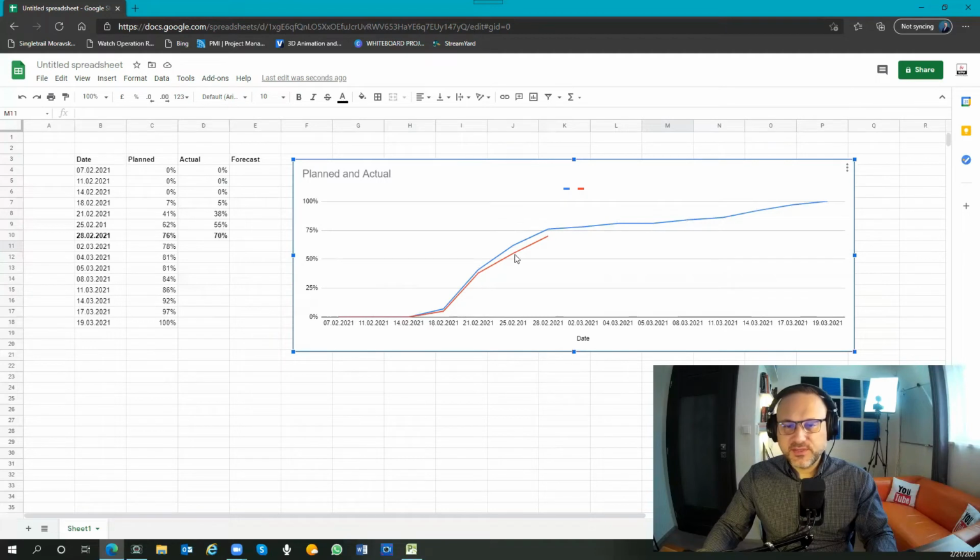So if the curve is less, you need to add some area over the planned curve or beyond the planned curve. If it's going beyond the planned curve, that means the project will be in delay. If you are going above, that means you are crashing some activity, you are speeding up with some activity, means you are feeding more cost, more money in this activity to complete in time to avoid any penalties. Okay, so this is very simple way, very practical.